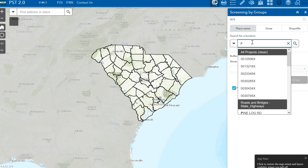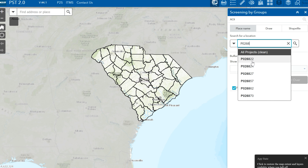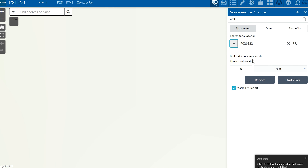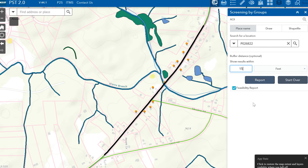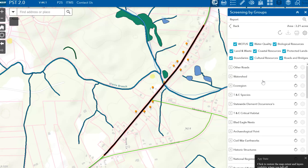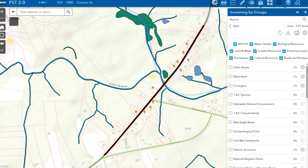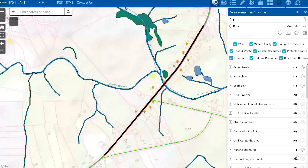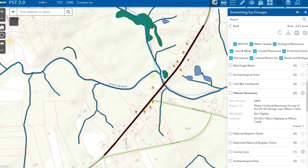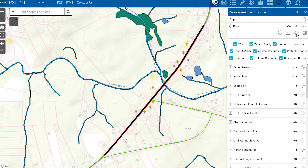A key time savings was the ability to use a unique project identification number to zoom into the project location. PST applies a project area buffer to produce screening reports identifying potential environmental concerns. PST reduces time and increases ESO's productivity. A desktop screening of limited data sets, which previously took four to six hours, now analyzes more than 100 data sets in just a few minutes and yields consistent results among all users. PST's internal traction prompted the development of customizable components, or widgets, to assist SCDOT's planning and right-of-way divisions.